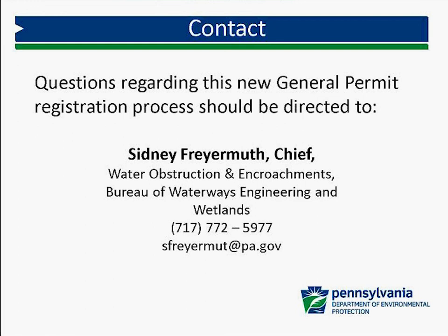For pipeline projects on the aquatic resource impact table, is it acceptable to report actual impact acreages of wetland impacts that are different than crossing length times width? No, we want length times width. We will calculate what the acreage is.